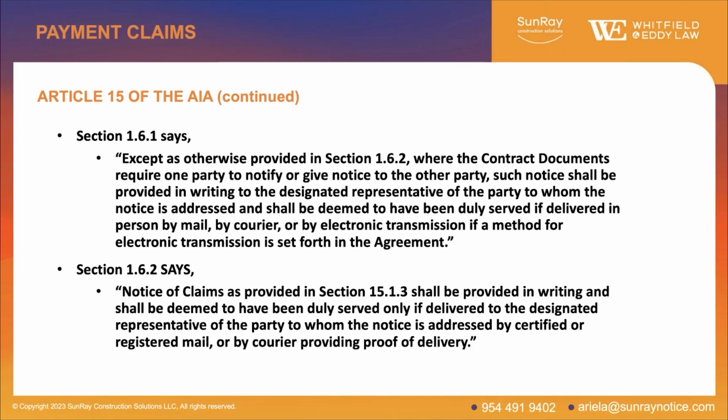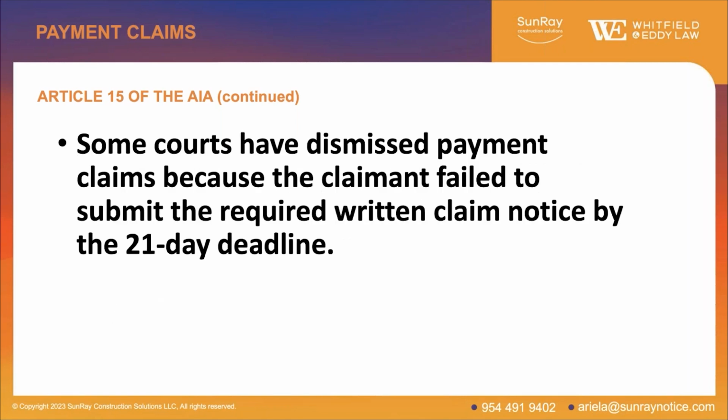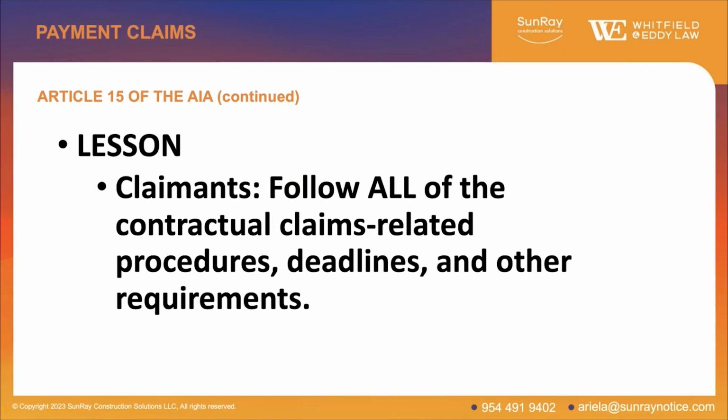But who knows? If we go to the next slide, and again, these deadlines are important. There's court cases around the country that have these similar provisions where the courts have kicked out an otherwise valid claim because the required written claim notice was not given by that 21-day deadline. So make sure you comply with that. And I think finally the last slide is follow all of the contractual claims related procedures, deadlines, and other requirements.